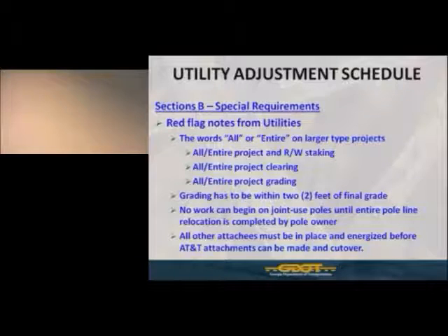if the grading request is something to simply minimize an additional depth on a manhole or something, depending again on the scope of the project and the nature of the specific project, that may or may not be something that's acceptable. If that causes a potential delay to that project as deemed by the district utility office, they may ask you to go ahead and complete that work, even with an additional depth structure or something, in order to be out of the contractor's way. Again, just keep that in mind. It may need additional clarification.